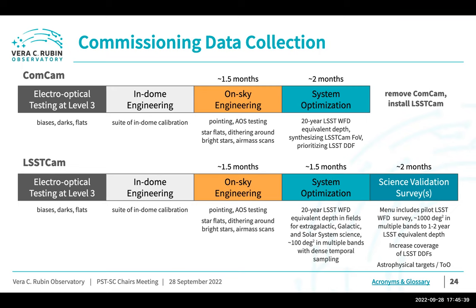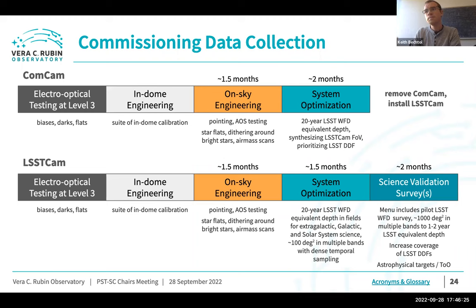Leanne adds an important point about DP1: throughout commissioning with ComCam, data is processed every night, possibly with different versions of the science pipelines as bugs are found and fixed. When we reach the end of that period, we stop, take all that data, produce a release of the science pipelines including all fixes, then reprocess everything with one fixed version — and it's that reprocessed version that becomes DP1. Likewise for DP2.